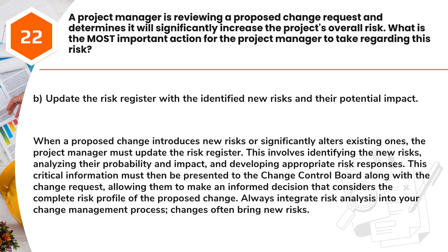Answer: B. Update the risk register with the identified new risks and their potential impact. When a proposed change introduces new risks or significantly alters existing ones, the project manager must update the risk register. This involves identifying the new risks, analyzing their probability and impact, and developing appropriate risk responses. This critical information must then be presented to the Change Control Board along with the change request, allowing them to make an informed decision that considers the complete risk profile of the proposed change. Always integrate risk analysis into your change management process. Changes often bring new risks.